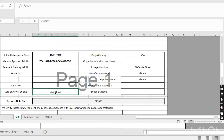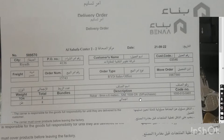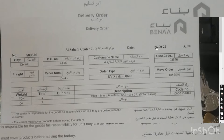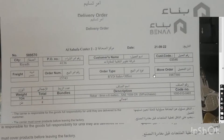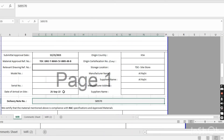When you receive the material, you put that date here. You get this date from the delivery note. We received this material on 21-9-2022, so you put that date here. Then for delivery note number — this is important — you take this delivery note number from the delivery note and put it in the MIR.